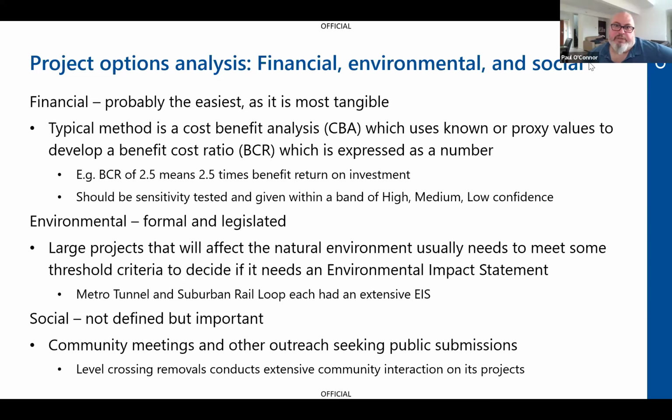And because of that, they had to do quite a lot of work. If you've ever driven between the Victoria Market and RMIT, you'll feel on the northern side quite a lot of bumps as you go down that lane, because they have these very large capture wells where they try and capture that contaminated water before it can go near the construction site.